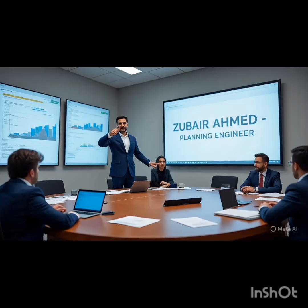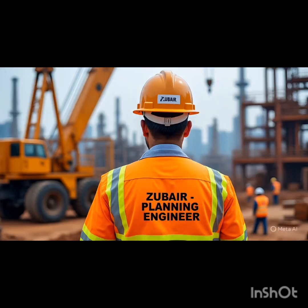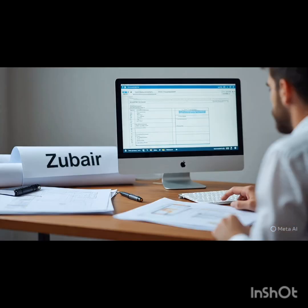A good FEED package gives you enough detail, like preliminary process flow diagrams, PFDs, to get a decent cost estimate, usually what they call a Class 3 estimate. Accuracy plus or minus, say, 20%. Good enough for the owner to make that final investment decision, the FID. Gotcha. So after FEED, you commit the big bucks.